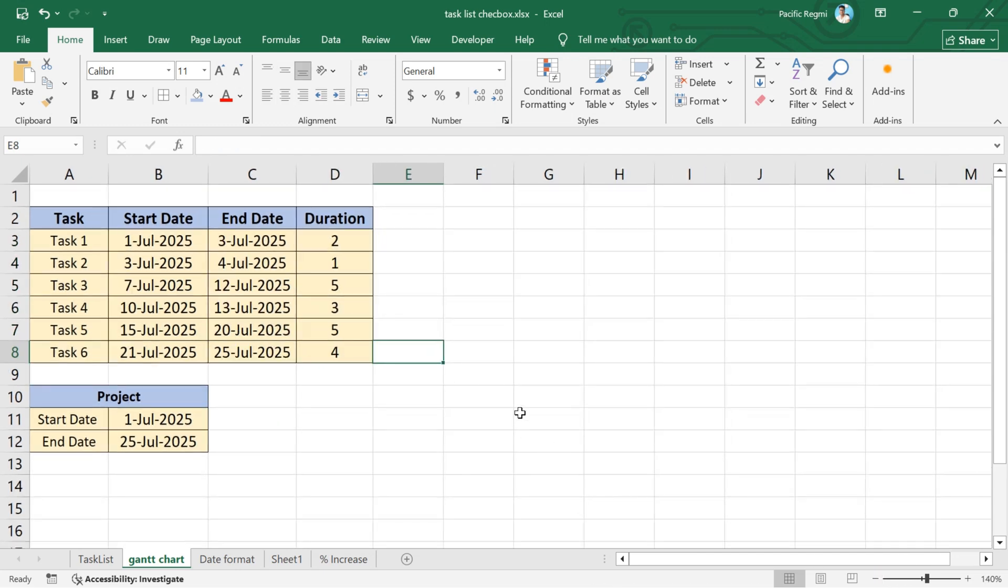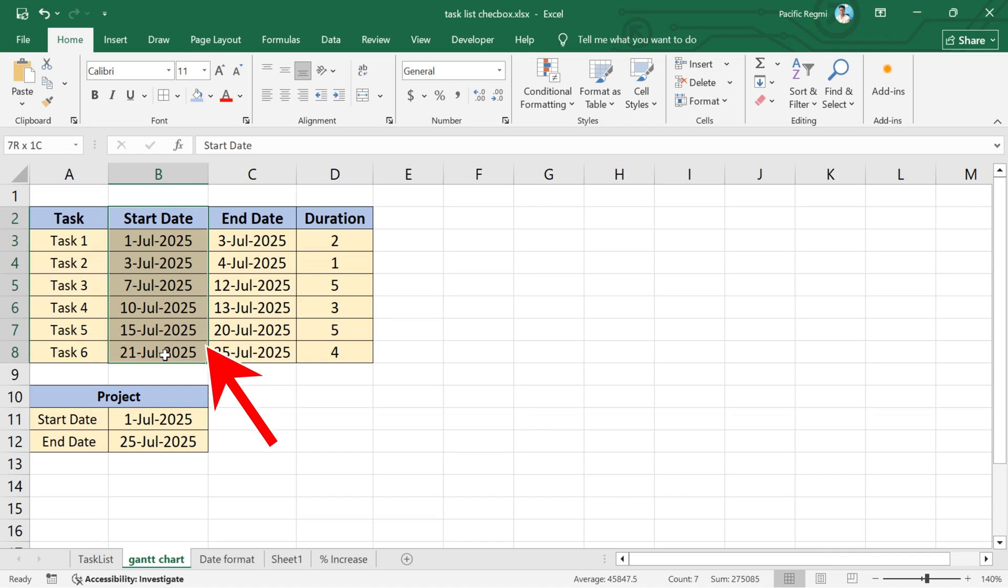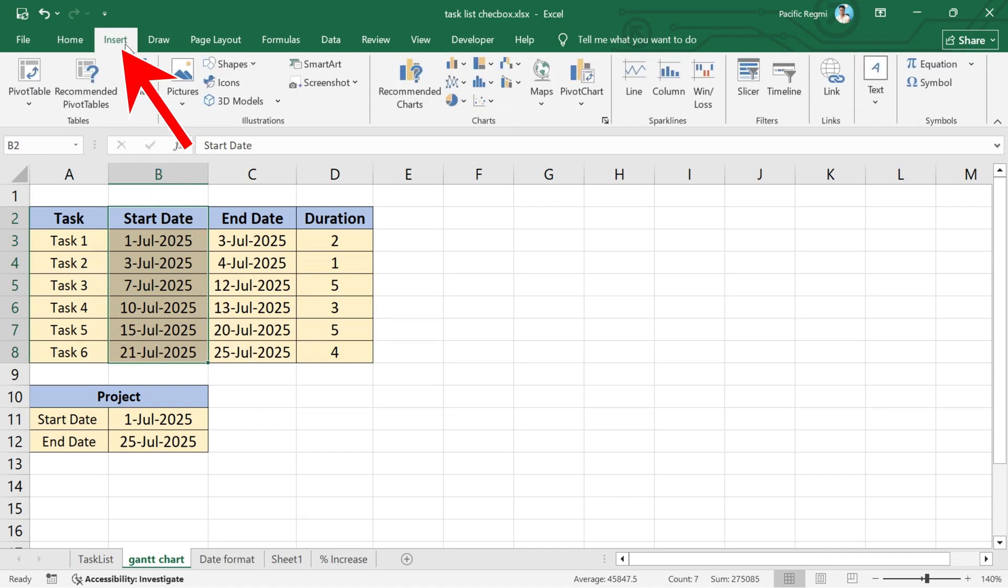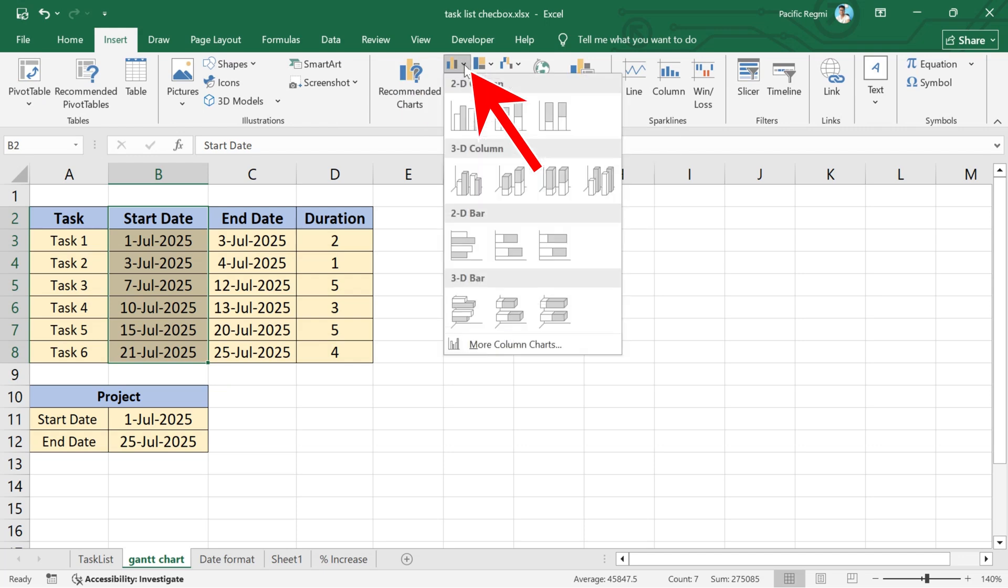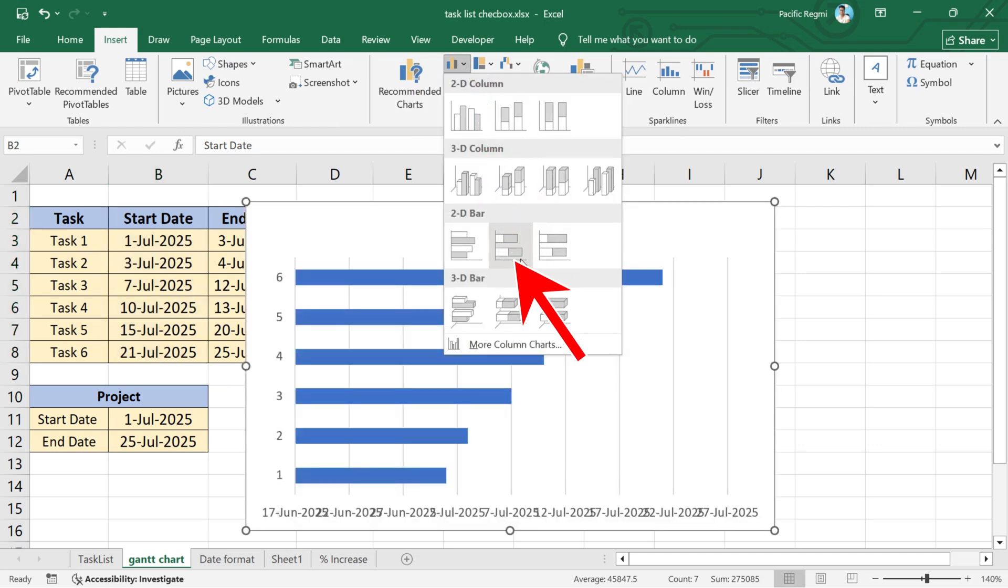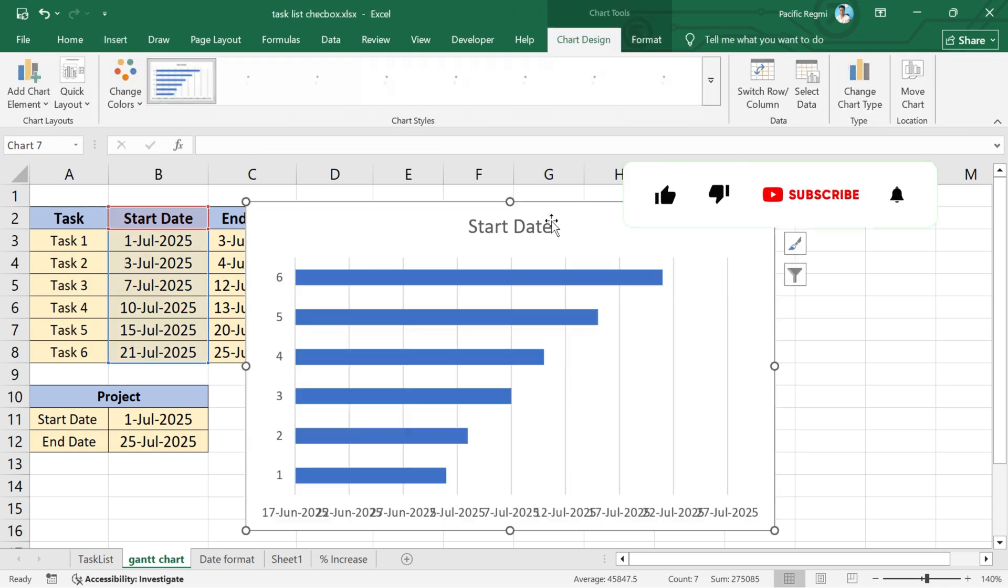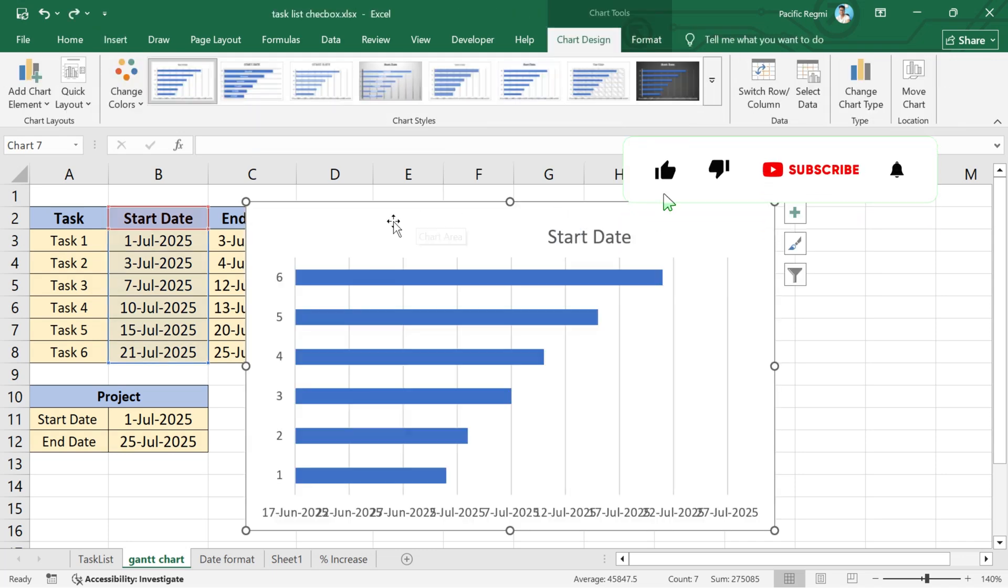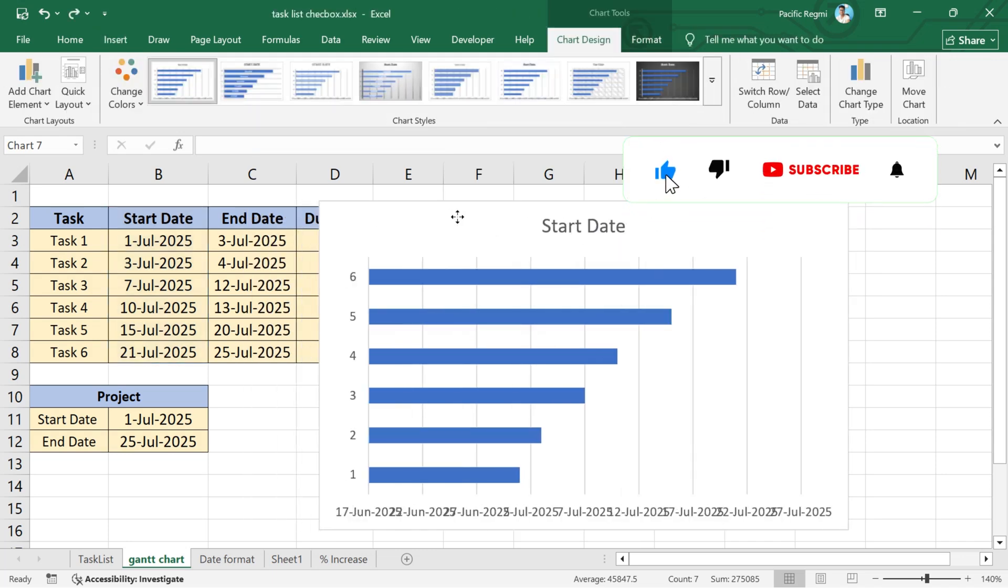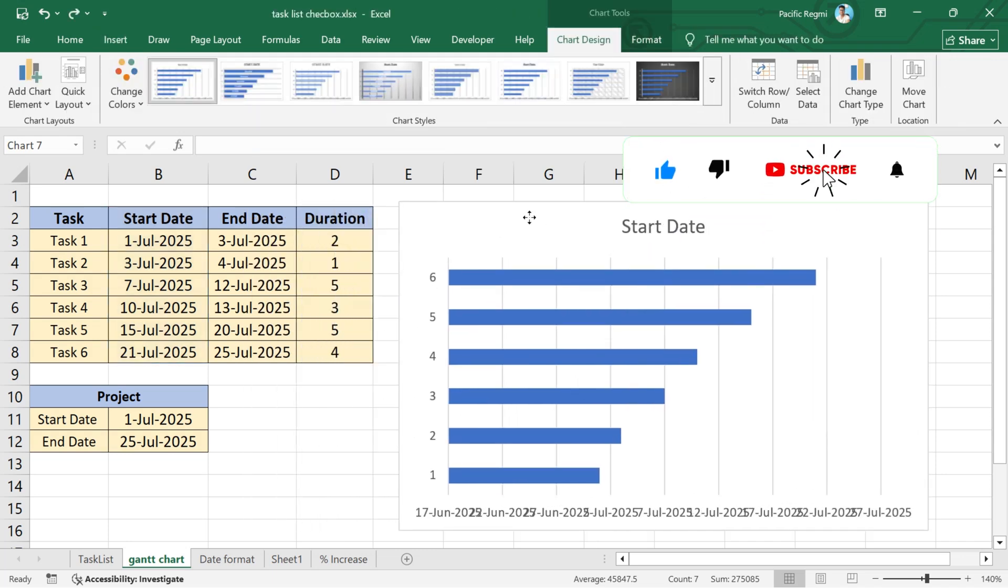Now, select the start dates column. Then, go to the insert tab from the top menu. In the charts group, click on the bar chart icon. From the drop-down menu, select stacked bar chart. Excel will insert a stacked bar chart showing the start dates.